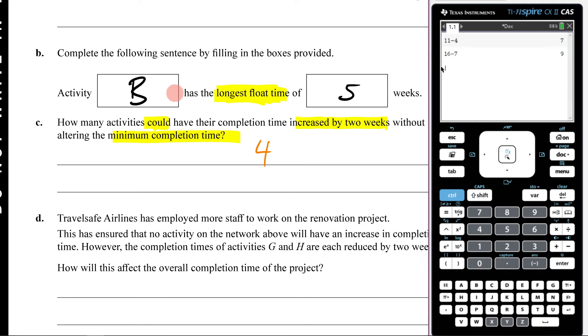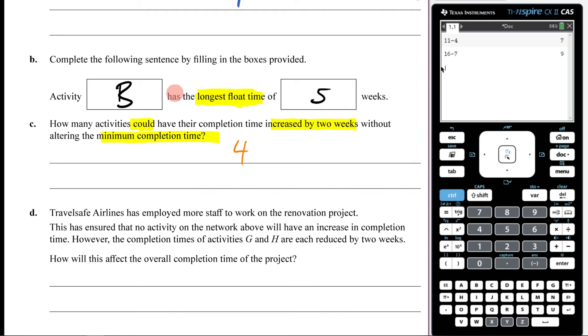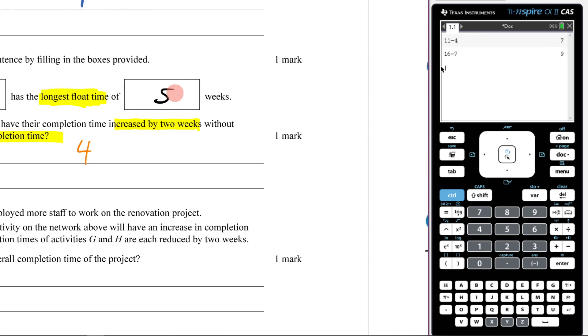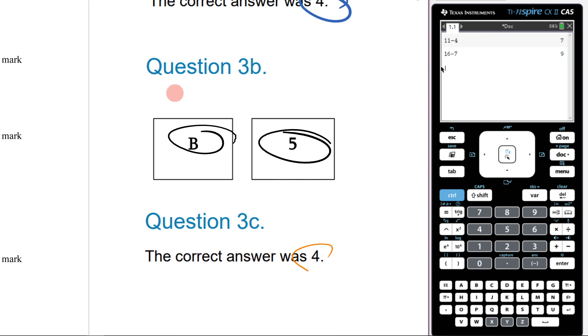How many activities could have their completion time increased by two weeks without altering the minimum completion time? Four activities could have their minimum completion time increased. So my answer is four. Correct answer was four.